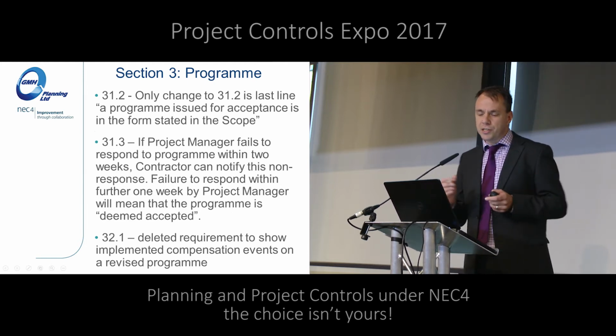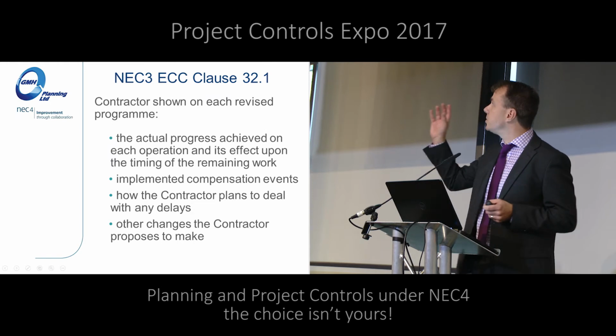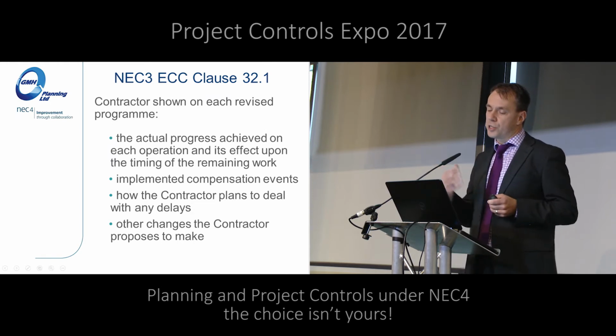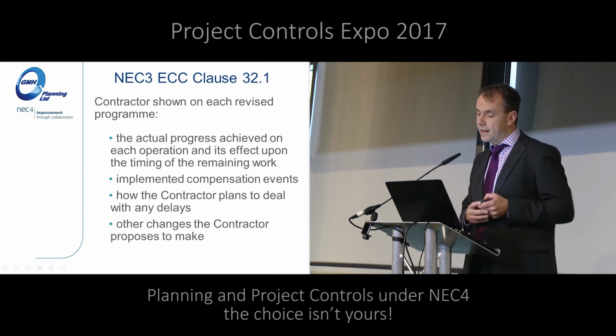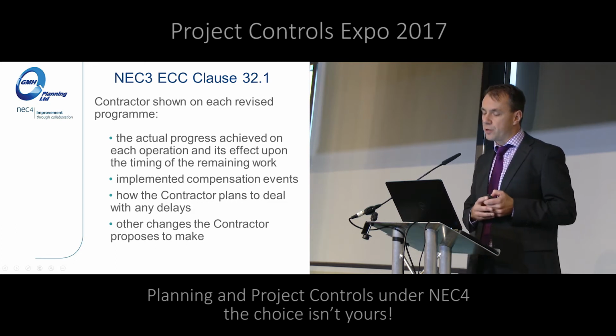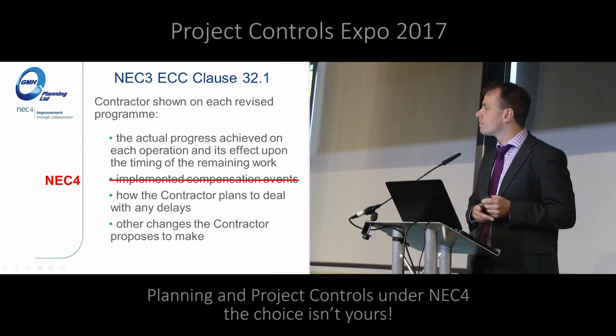32.1, slightly strange change here. They've deleted the requirement to show implemented compensation events on a revised programme. So if you remember, this is NEC4, and you've got to show actual progress, implemented compensation events, how you plan to deal with delays, and any other changes the contractor proposes to make. So NEC4 has actually deleted that line.